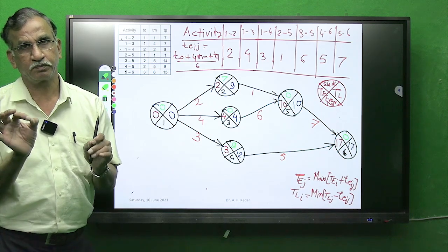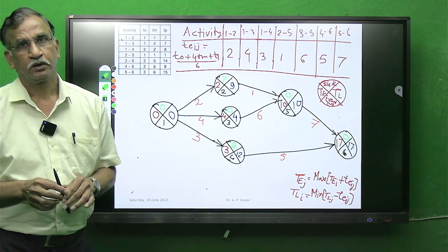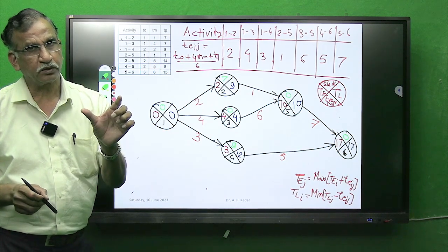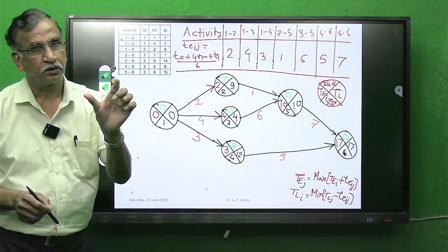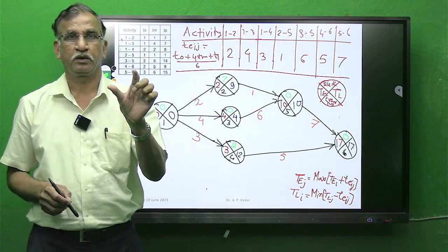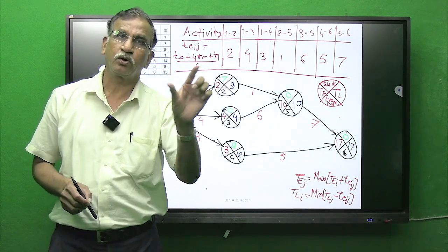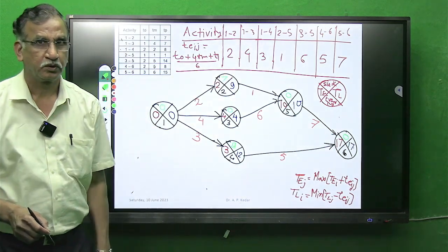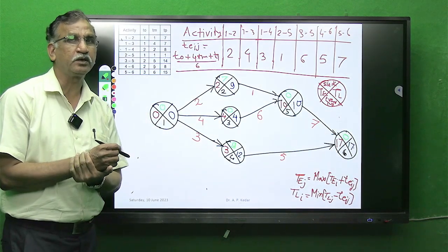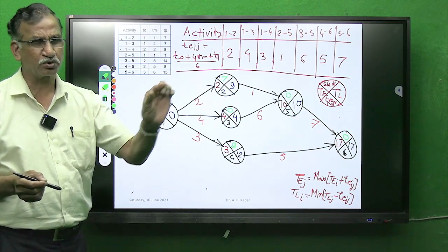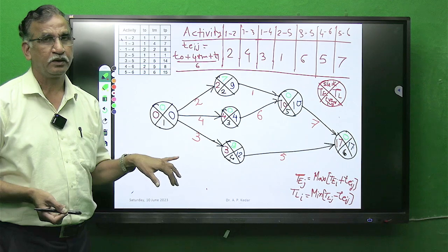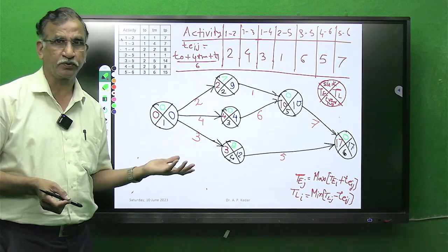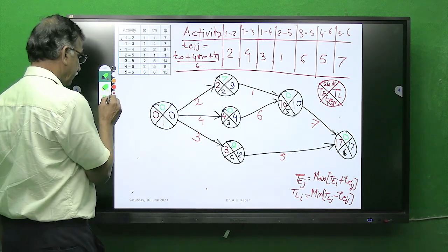Very important statement I am quoting. Only join those activities with 0 slack which make the path longest path, and represent critical path by either solid line or by double line to identify the critical path from different paths. How, that I will explain.